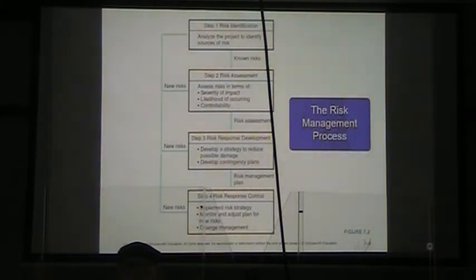Now, on the other hand, think about the probability of not being able to develop a new technology. Well, that might have a tremendous severity of impact. We would look at our new technology in terms of how far away is it from technologies that we have now when we think about the likelihood of occurrence. And we would look at things like, have there been successful experiments that show this technology is workable, other things of this nature.